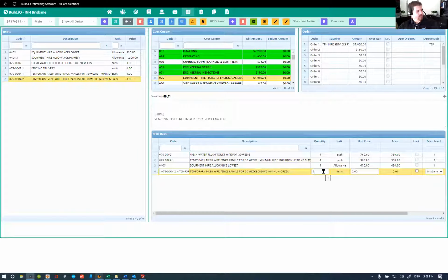Now the house is, once again, shorter ceilings, very, very straightforward roof. I would have to say with pretty decent certainty that our square meter rate on this one would have to be in the vicinity of, like 55 to 60 a square meter, just due to how simple it is. Let's go say 52.